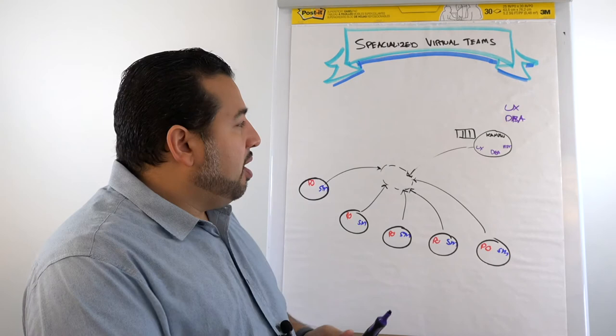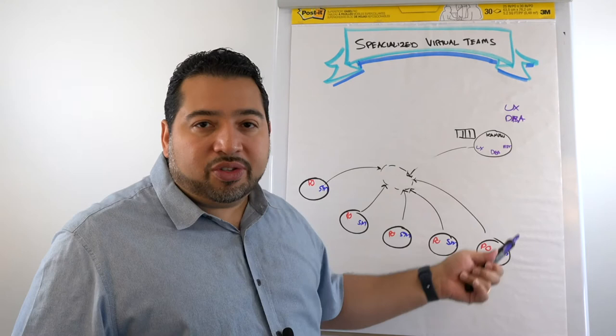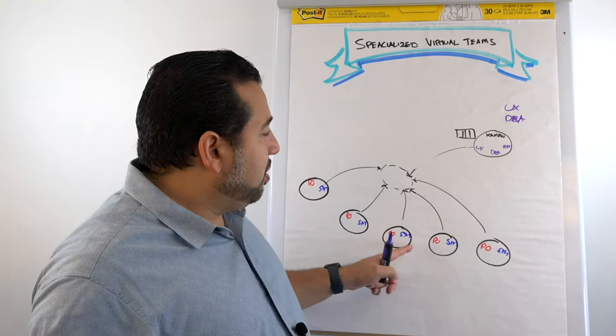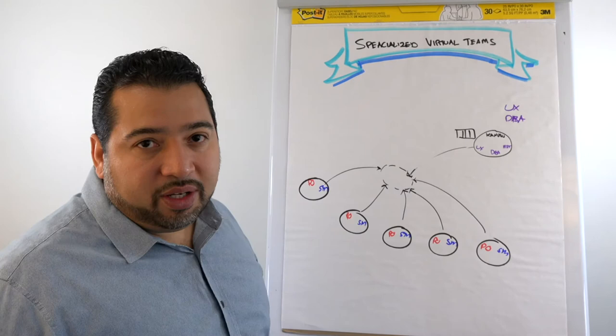And then you could track based on your Kanban metric items, where maybe you still don't have enough of a certain skill set. So one way is create a Kanban team of your specialized roles, escalating the issues on a daily basis to those roles. And then maybe product owners can request into that team and put things on their Kanban board to prepare for things coming up in the future.